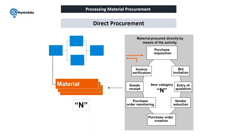Direct procurement is the process where we are directly procuring material for our project. The steps are: create a project, create a purchase requisition, bid invitation, vendor selection, purchase order, purchase order monitoring, goods receipt, and invoice verification. The purchase requisition can be created from the project builder in CJ20N. Bid invitation, quotation entry, vendor selection, purchase order, and goods receipt are all managed in the Material Management module.